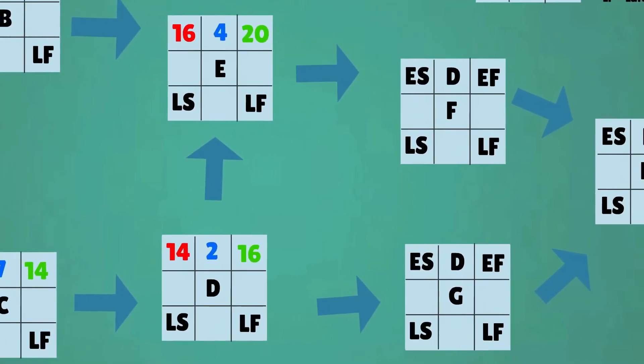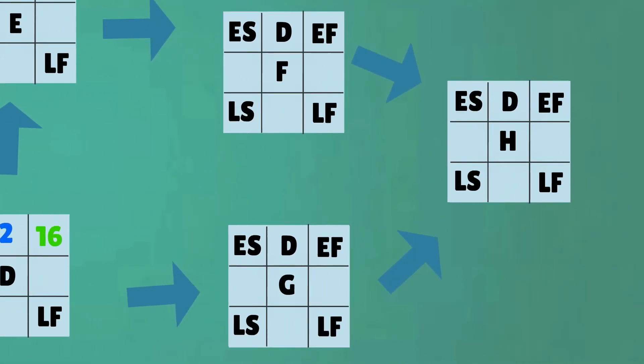This same scenario is applicable for activity H. Activity H is dependent on both activity F and activity G. Therefore activity H has an early start of week 25.